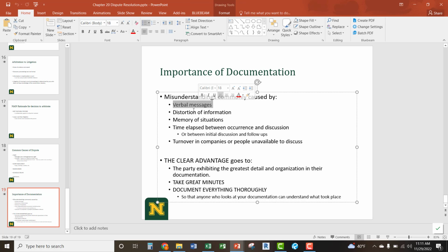What I've always recommended to students, and what I used to do, is have a call log, so that every time I had a phone call with anybody, I'd jot down a few notes of all the key points that were discussed, and then generally have some sort of quick follow up into writing with an email or into whatever our documentation is for our daily meetings or weekly meetings, just saying, based on conversation with so and so on X date, it was decided that we were going to do this. Those are the little things that help set the tone. Everyone understands that we're on the same page. That was what was discussed.